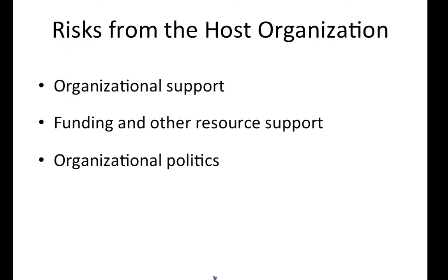Recall that the host organization is either one, hosting a project for an outside client, or two, hosting a project for its own use. Many sources of risk are the same for both kinds of host organizations, but may surface in different ways. For the organizational support, we need support from higher management for the project. Projects need to be championed by higher leadership, particularly when problems arise. It's also needed for funding and other resource allocations. Getting funding on time as the project moves forward is critical. Volunteered support may not come through as assumed. There's often resistance to promised or ordered help from other parts of the organization.